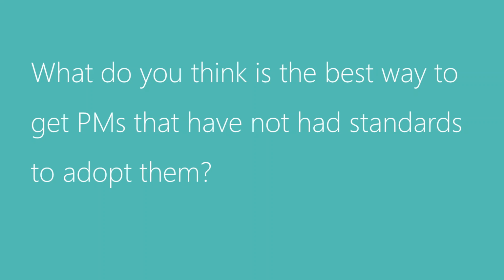So any of those open-ended questions, especially the one about success, because when we get down to that category in the charter, in my experience, that and risk are the 2 most underutilized areas of a project charter. They're very, very key, very important. All right, well, thanks for sharing those open-ended questions.